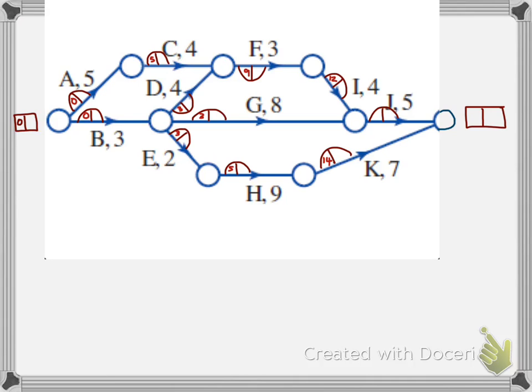Now we're up to activity J. Now think about this. We're sitting over here waiting to start activity J. Who are we waiting for? We're waiting for activity I. I started at the 12-minute mark. It's going to take 4 minutes. I will be finished at the 16-minute mark.